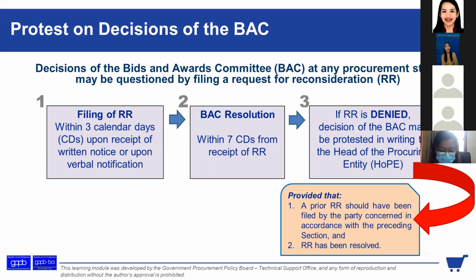If granted, then balik kayo kung saan na point yun. Kung naging siya yung lowest calculated bid, tapos during post-qualification, pinost disqualified nyo, tapos na-grant nyo, o di balik kayo doon, siya uli yung lowest calculated bid, kasi mali pala yung disqualification nyo. Or if nag-fail sila during the opening of bids, pwedeng balik kayo uli doon. Kasi di ba may procedure during the BAC opening kung anong gagawin sa mga nag-inform na magpo-protest sila.